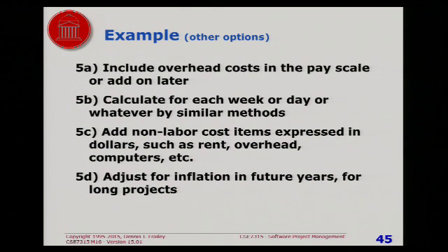But that's the particular example I'm using. Now, a couple of other things you could do along the way here. You could add overhead costs. In other words, the pay scale that you use could either be a total including overhead, or it could be the actual salaries, and then you add an overhead factor later. It's kind of up to you.